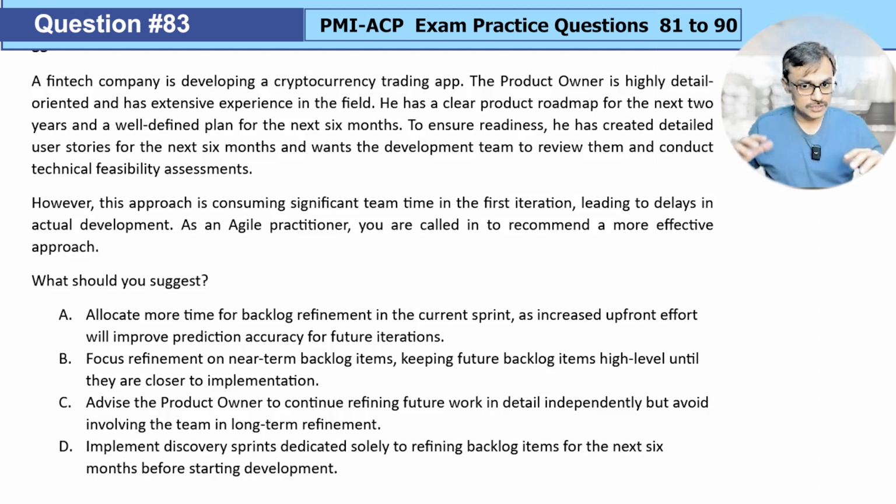But since we are focusing on the ACP exam, we are not even assuming the waterfallish way of working might be suitable here. And we know that there is a clear violation of progressively exploring the requirements and continuously responding to change, because you are thinking too much ahead. That's one aspect. Second aspect is that if teams spend too much time in doing this kind of estimation work, they will not be able to finish their current iteration work. They are unable to achieve the value in the current iteration.